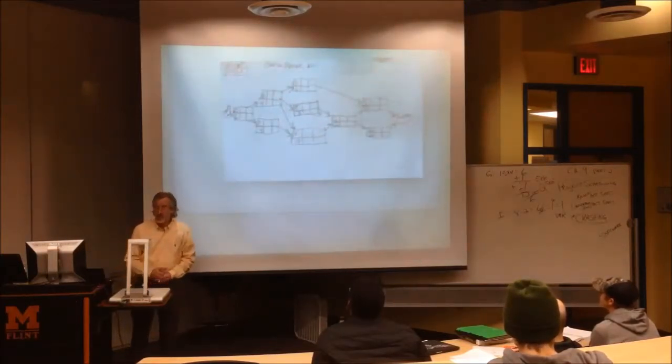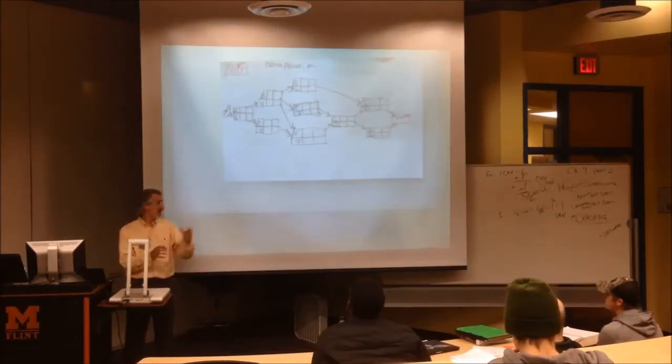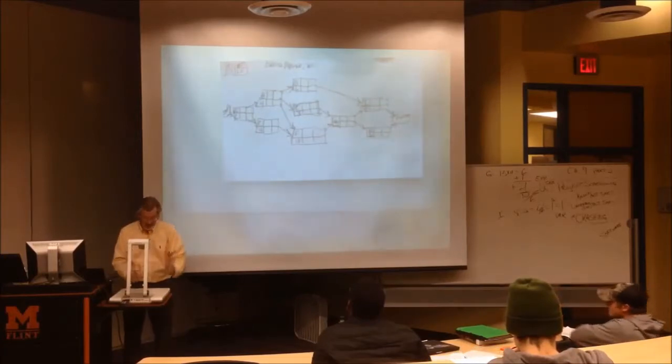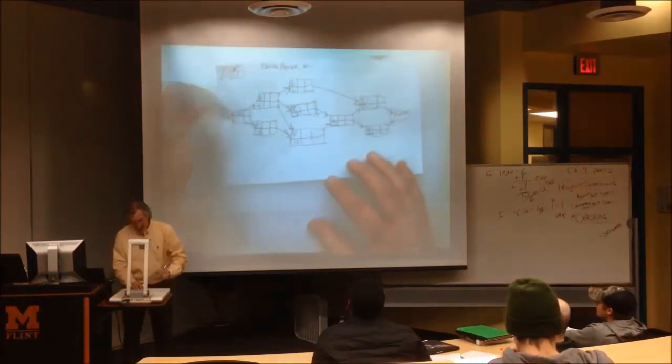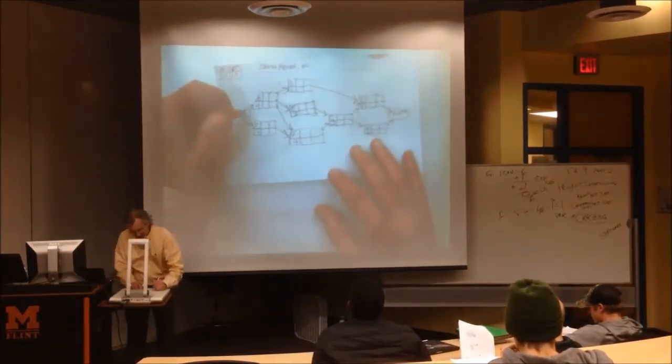Let's try it though. Look at A, coming straight out of the beginning. It's 6 units of time. Any activity that comes directly out of the start, you start on day 0. That's the earliest start, 0. It can be finished in the amount of time it has on there, which is 6 units of time, so it can finish as early as 6.